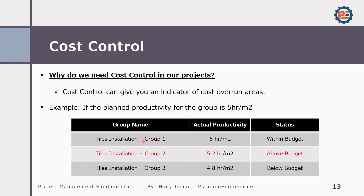Group one is within budget because its actual productivity matches the planned productivity. Group two is above budget — they are spending 5.2 hours per square meter while they should spend only five. You might think the difference is small, but imagine doing thousands of tile installations — you will lose thousands of hours. Group three is performing better than planned productivity, so it is below budget.